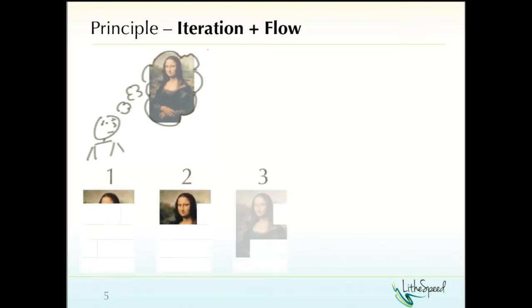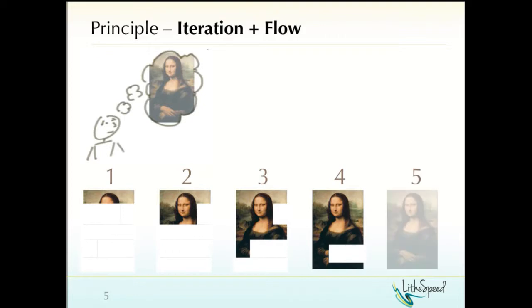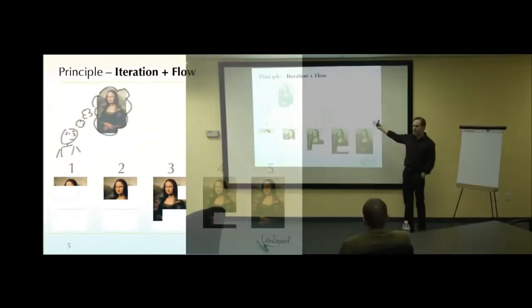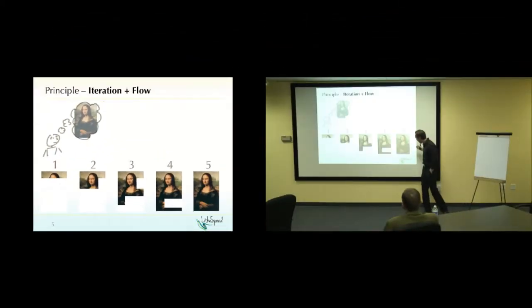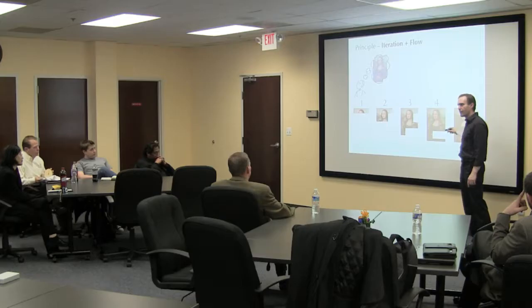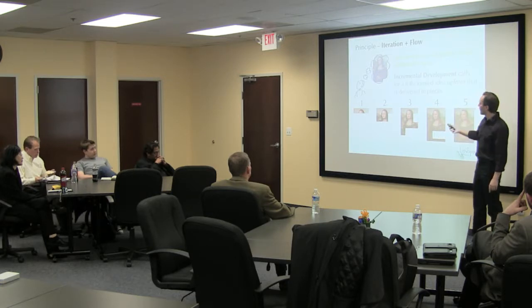This is an example of incremental development, which is what a lot of people view methods like Scrum and XP and so on as in fact being. They're incremental approaches, and of course they are, but what's wrong with that? If you look at this picture, in order to do that, what would you have to have? You have to already know what you're building, right? I mean, having the entire end result perfectly in mind is necessary in order to be able to slice it in this fashion.